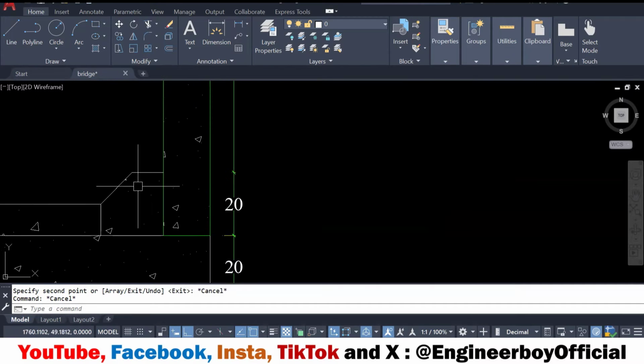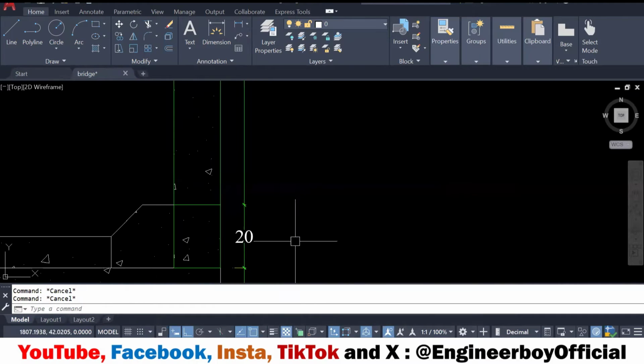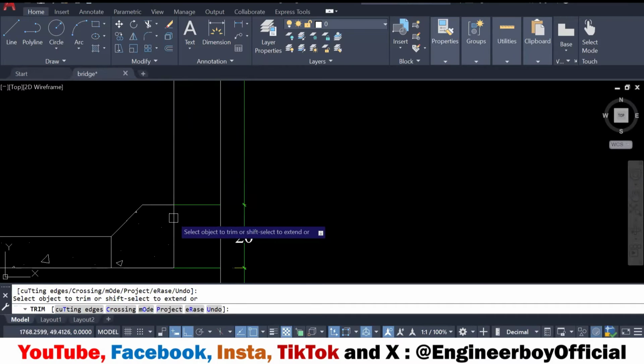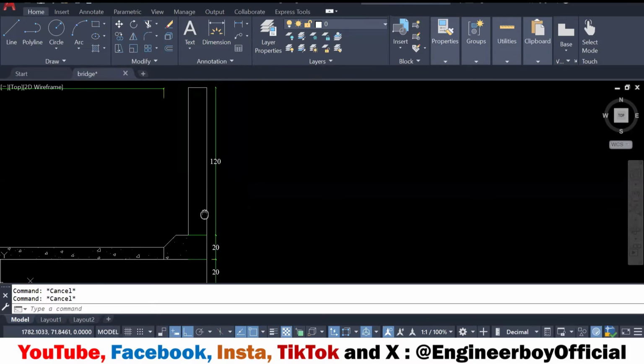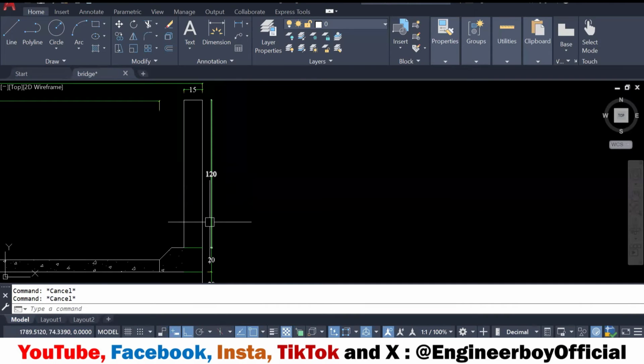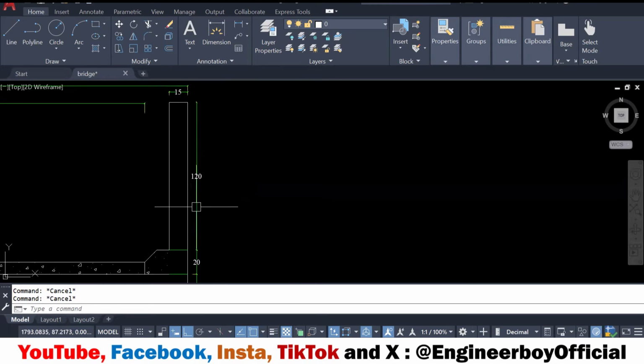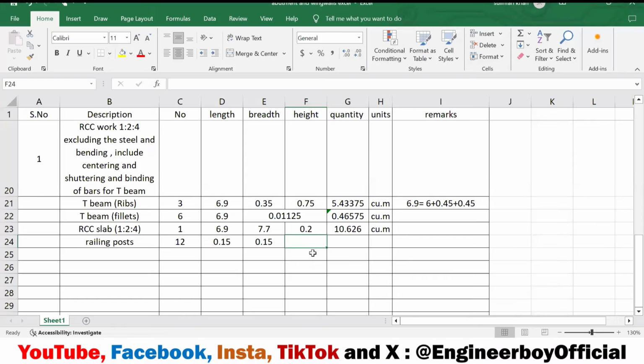However, if you skip this area, if you extend the curbstone up to this point, then it can be only 120. So let me delete the previous one, let me remove this one. It can even be in this form. If we are taking it without the curbstone, 120 can be the height. So I can put 1.20, and I can just drag the formula down one row.